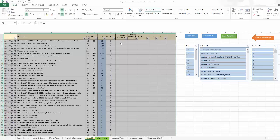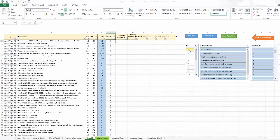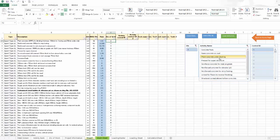Now I'm ready. The idea here is to put the activity Control ID. I'm working now in division number three, so I can click here 'Division 3' and this will filter all the activities from my activity bank which are related to division number three. So now I'm talking about plain concrete for blinding — this is plain concrete under footing — so I'll click this activity and I'll click 'Add Control ID'.